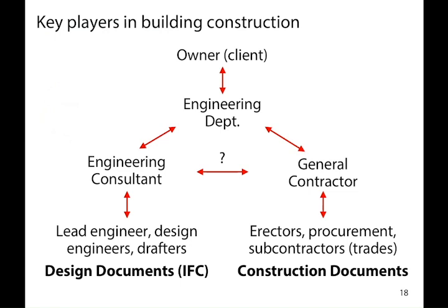And the worst part is that under the general contractor, your steel fabricators and erectors are actually the ones who are responsible for designing parts of the structure. The lead consultant, the lead engineer, is responsible for designing the beams, columns, braces, et cetera, in the building. But how everything fits together and how everything gets connected is actually the responsibility of the fabricator erector. And so there's some engineering happening long after the engineering happens, and they're three arms of communication away from making those things work.